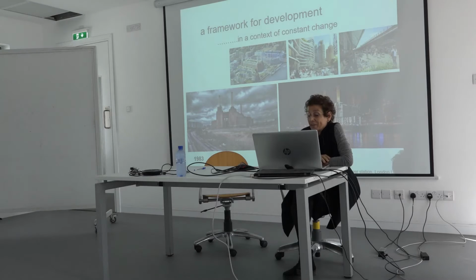which a large site needs in order to develop. For example, I don't know if you know London at all, one of the latest very large developments in London is Battersea Power Station. You can see it on the left in a very central location in London, but a huge industrial site which was decommissioned in the late 70s. The conversation about the fit out of that place and its master plan started in 1983. Actually, in the late 80s, I was involved in writing a brief for it. And the first houses were delivered in 2021. That makes 40 years for a master plan to mature and actually become a place.